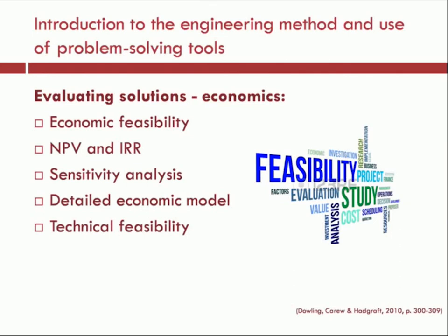Another very useful tool is sensitivity analysis. So when we look at the major criteria associated with a particular project again, and we vary that, that will give us an understanding of how robust our solution is. So if we find that some of our assumptions are such that any minor changes in those assumptions can lead to wildly different outcomes, some of which may not be acceptable, the sensitivity analysis assists with that particular process itself.